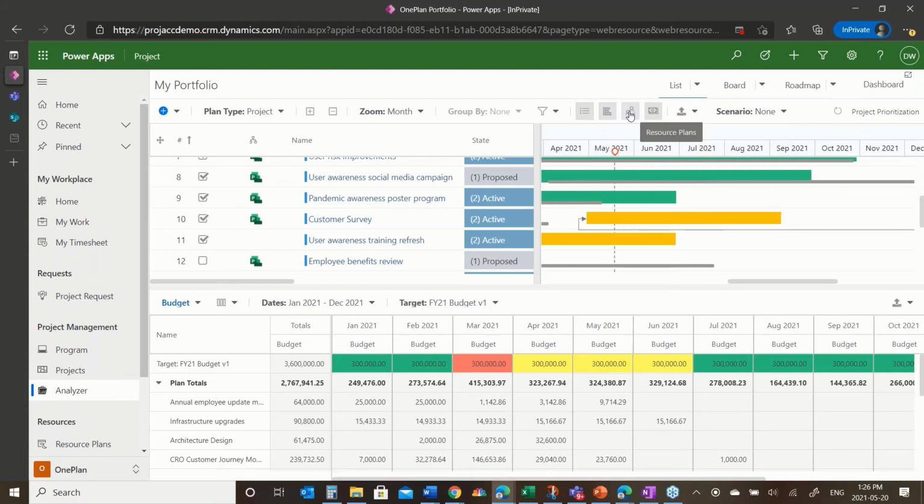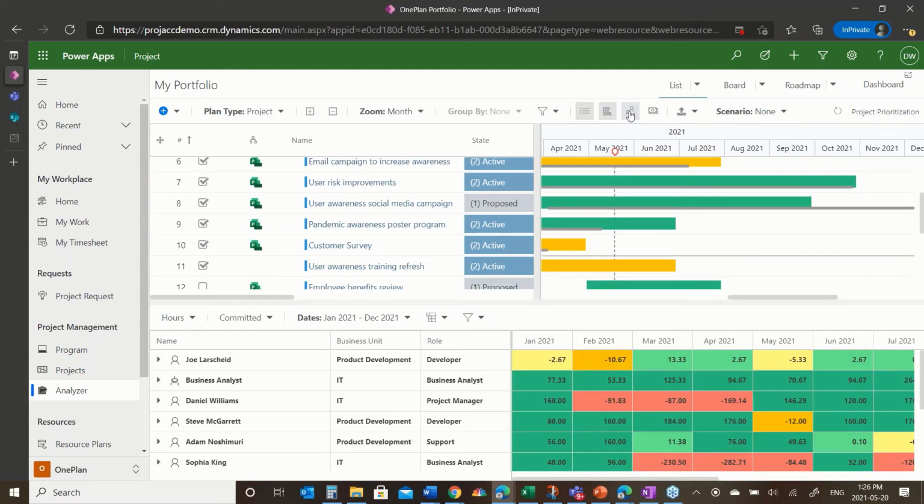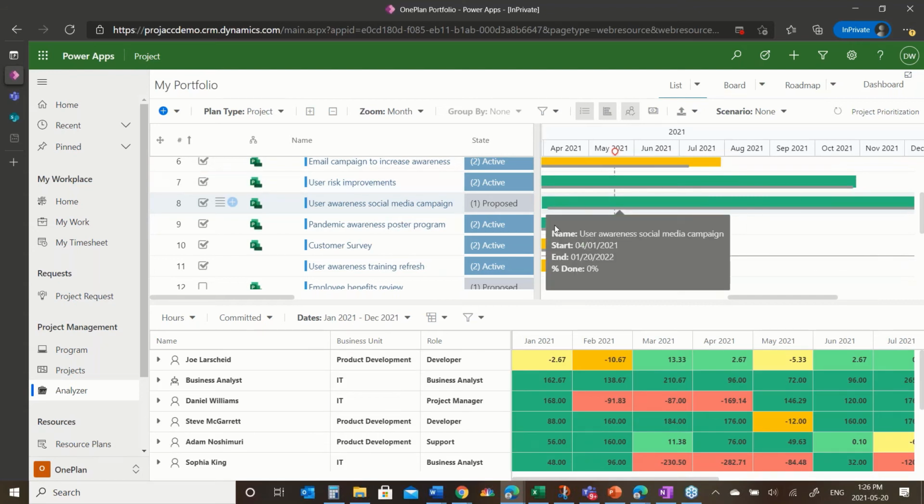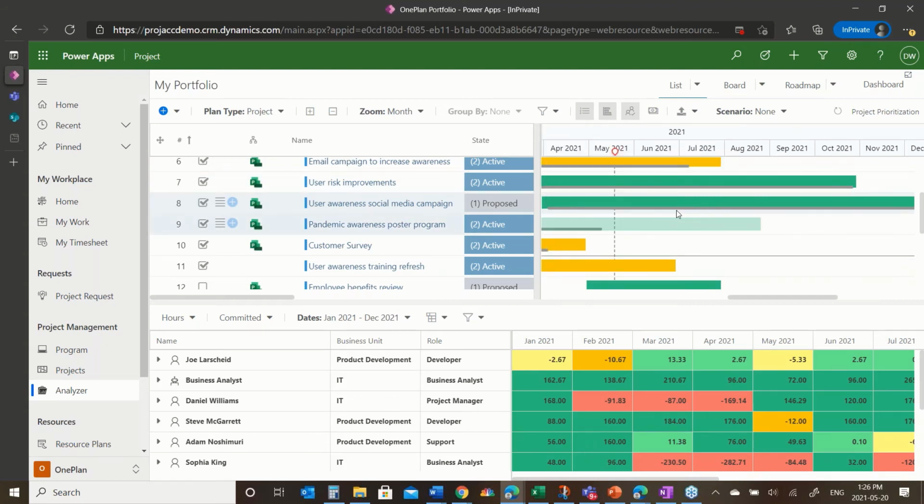What we could also do is pivot this in a different way. And now what we're going to take is that resource data from the resource tab that we did, those commitments, and say, well, if we try and do all the projects that are currently checked off, we have a number of resource constraints, Daniel being one of them, Sophia being another. And once again, what if I look at moving some projects around and see how that might move my stuff that's already in place.